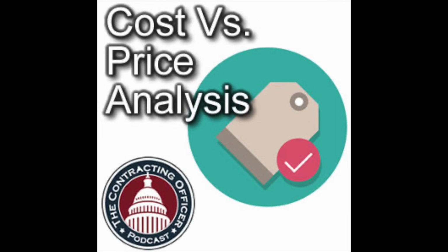Let me circle back again. Price analysis is what you do when you don't have certified cost and pricing data, and you don't have to go through all the individual elements. And you don't have certified cost and pricing data when it's below the threshold, or in a competition, where certified cost and pricing data is generally not required. So if you're in a competition, you don't necessarily have to evaluate every single cost element.